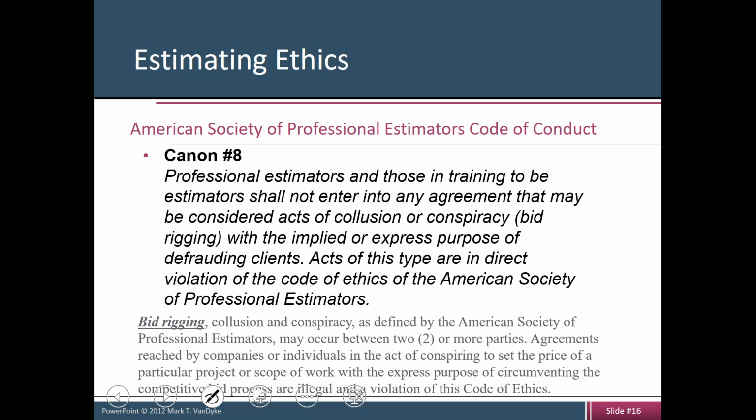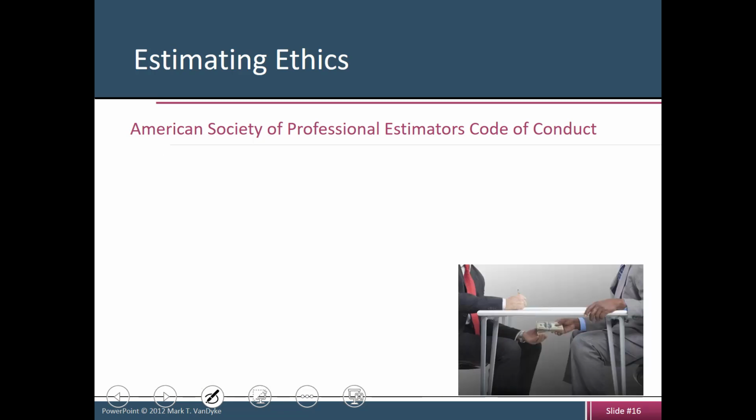They all came up with a price of, let's say, between $9 to $11 million, but they all convene and decide, you know what, let's just arbitrarily add another $5 million to our price. So whatever we have now, we're going to scale it up to a raised value for no good reason. That's called bid rigging, unethical, actually illegal, a violation of this code of ethics, and even I think a violation of law too. So it's very important for us to at least be familiar with what bid rigging means and stay away from it.